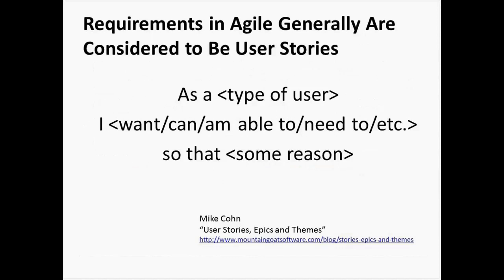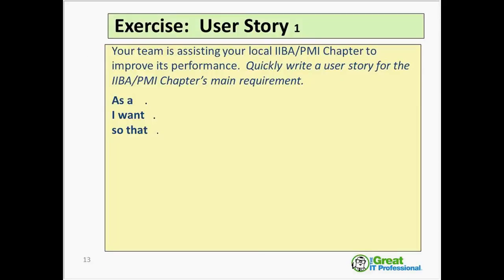Many of you are probably familiar with the general format that Mike Cohn introduced for documenting user stories. In agile, user stories are the vehicle for requirements. The typical format is: as some kind of a user, I want or need something, so that I can get some benefit. This is a pretty important and understandably popular format because it's a three-liner — and who could argue with three lines, especially if you've been accustomed to something more complex.